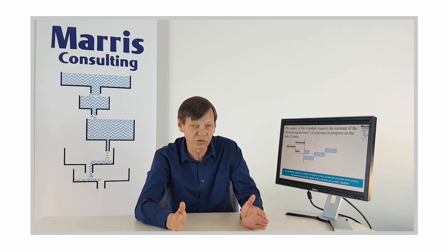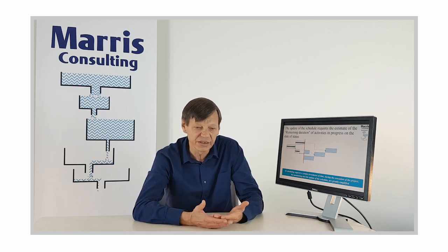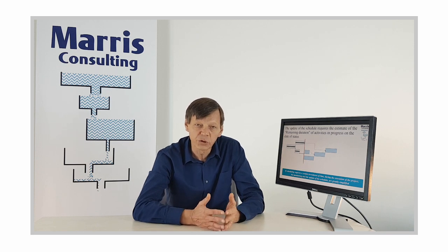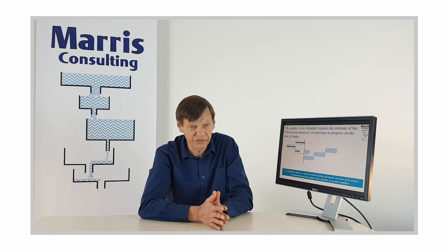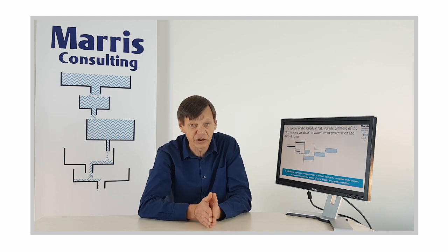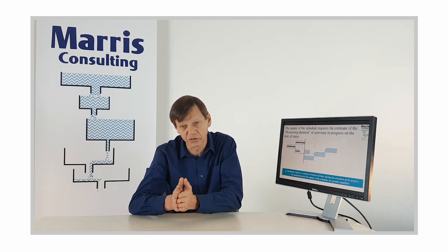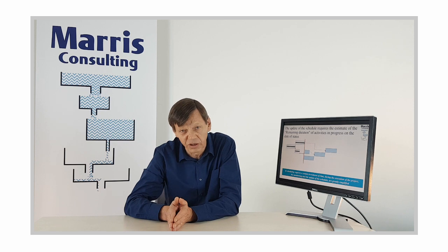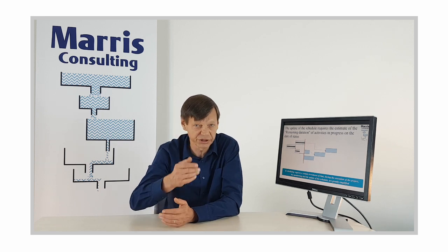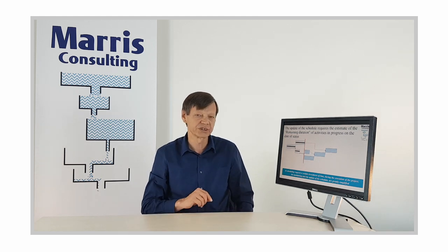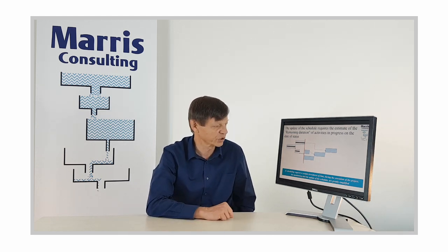And that is perfectly normal, because I remind you that the times that we're putting in the system are normally focused on average duration. So in half of the occurrences, I'm perfectly allowed to spend more time on that task than was planned. Okay, that's not a problem. We'll see why, or you know why if you've been following the series, because of the project buffer.